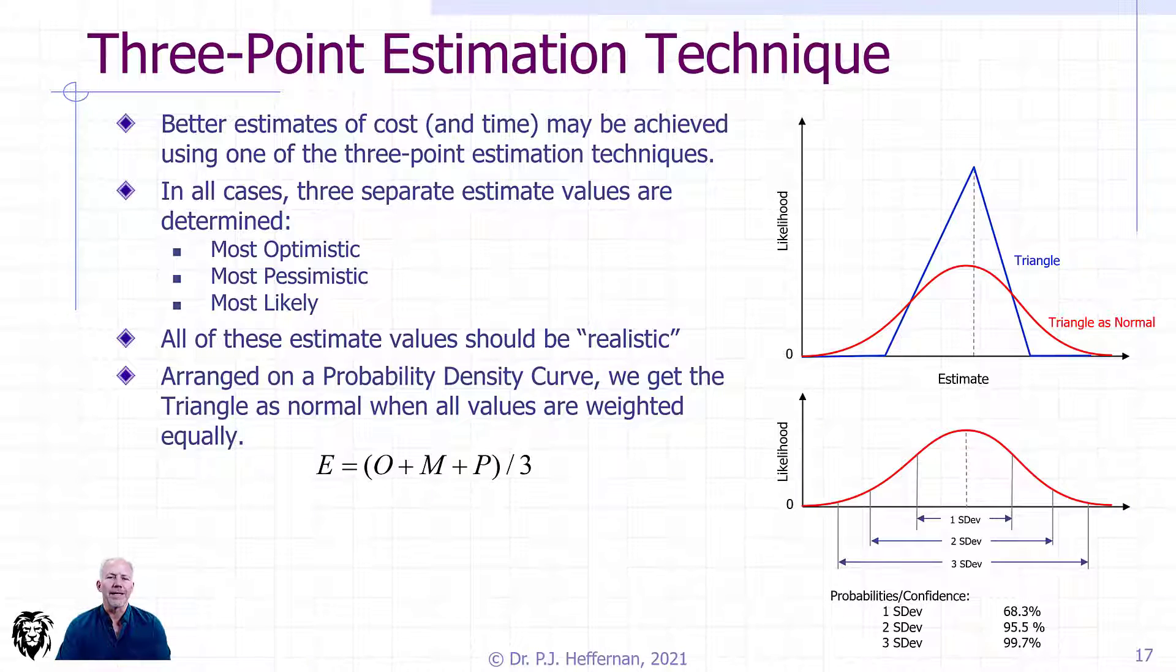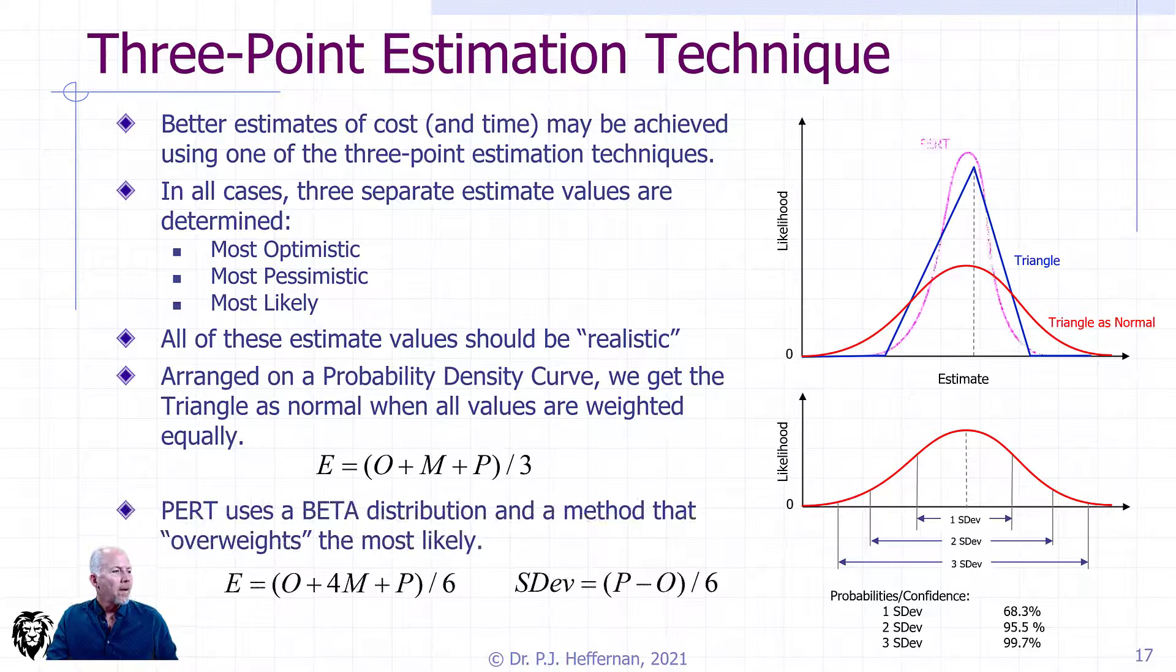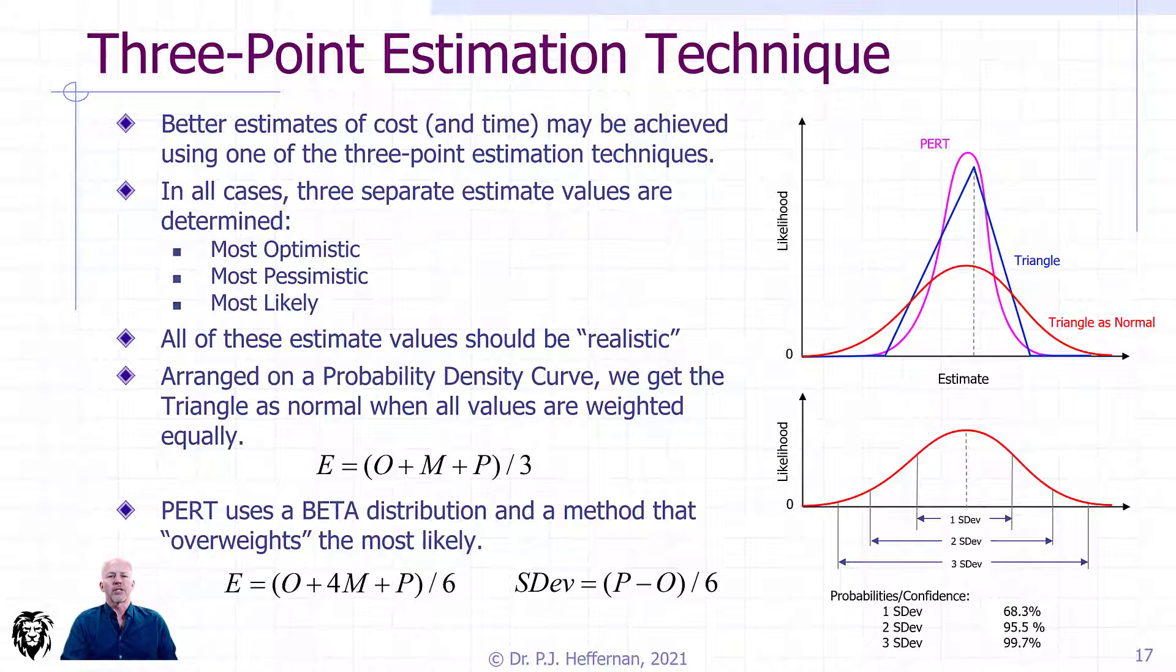PERT, which typically uses a beta distribution, I certainly have seen some writings where it also uses a normal distribution. I've only ever used it with a beta distribution. And it also overweights the most likely.